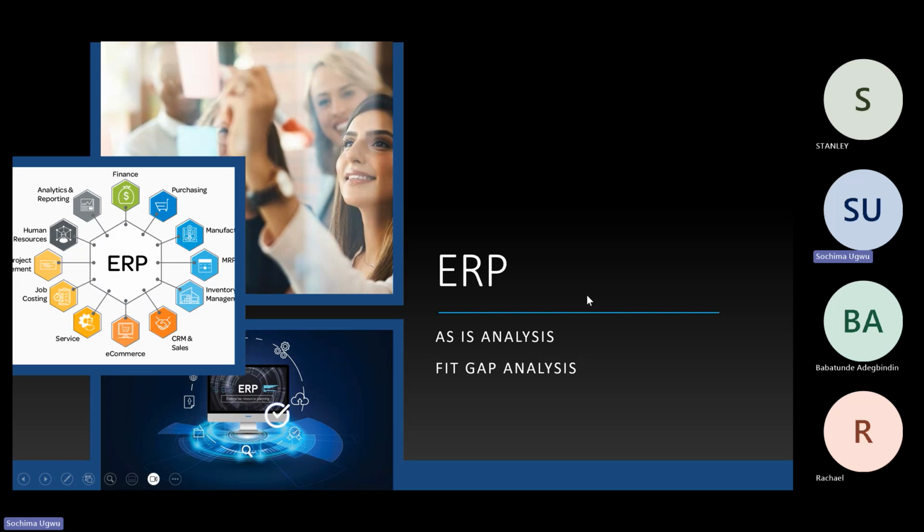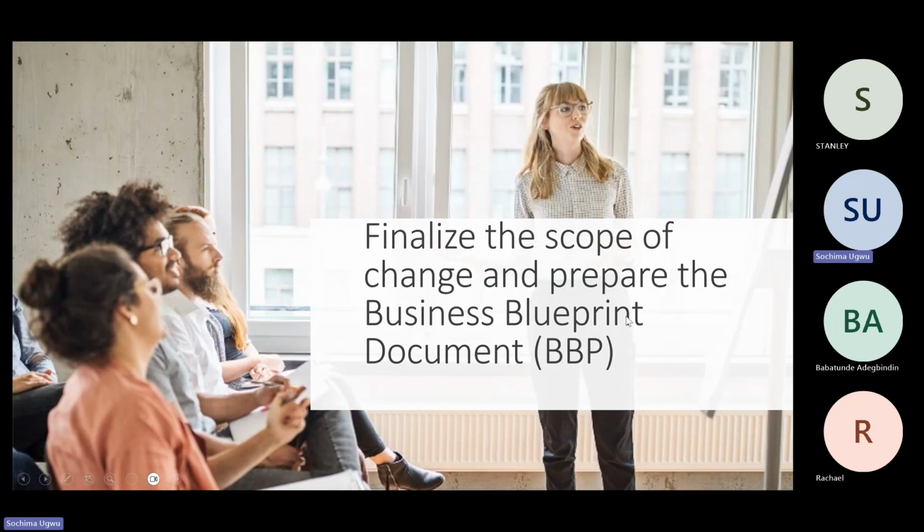Now, at the moment when we have this fit gap analysis already, it is time for us to go ahead and finalize the scope of this project. Because at the point when we're still starting, when we're doing our analysis and our fit gap analysis, we had a perceived scope, and the perceived scope could be limited to ensuring that we have a like for like, as well as all the functionalities that we need to support our e-commerce channel. So it can be as far as that.